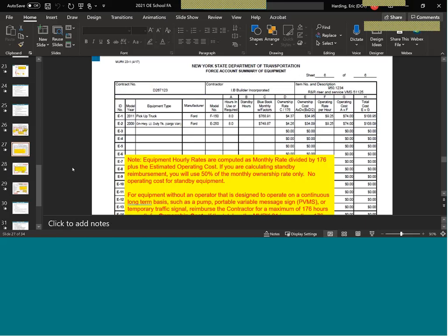I would say no. I've never run into that, but I wouldn't be happy about that. No, our spec says that we will only adjust based on age and region. No other adjustments are allowable to the published Blue Book rates. Yeah. Didn't realize that was a function of Blue Book, but yeah, I would not accept that.